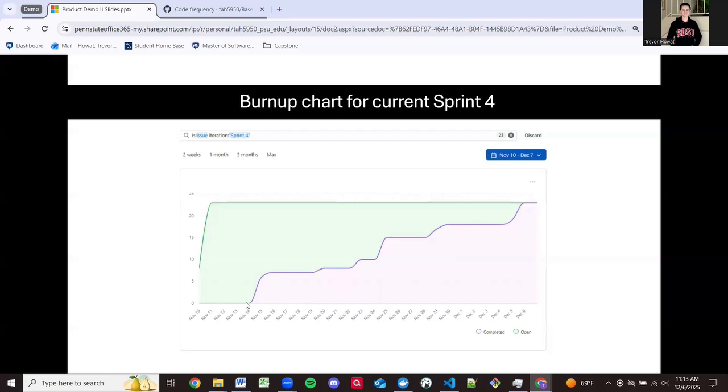There are also some user stories in here that rolled over since there were tasks that rolled over, and so those user stories are being closed. That's why you see a jump there. When a task closes, if it's the last task in the user story, both the task and the user story close, so there's a pretty steep jump. But otherwise, for the most part, this week here is pretty emblematic of how the pace typically goes. It's piecemeal: we see a task being worked for a day, it closes. A new task is worked for a day, it closes. It looks like maybe a user story closed here, and then it continues on before closing out right at the end of the sprint. We did hit our goals for all of our planned tasks in sprint 4.